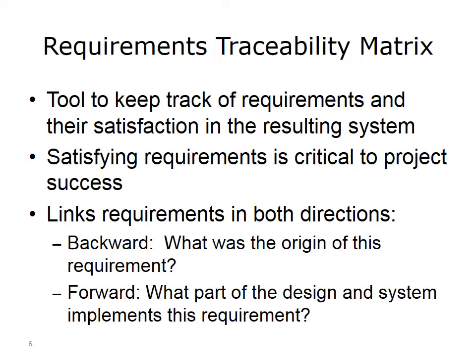A backward linkage addresses such questions as, where did this requirement come from? What is the business need? What stakeholder wanted it? Is there some documentation that affirms that this really is a requirement? When was it made? In many cases, the backward linkage may lead to the project charter or to your interviews with stakeholders, for example.